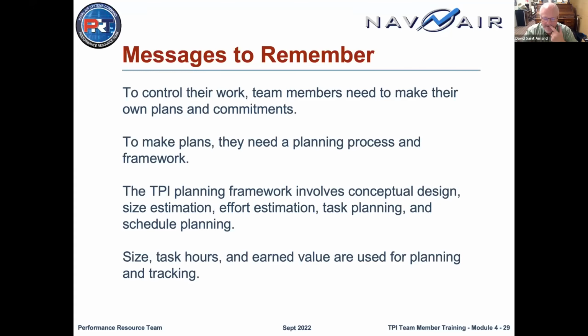I have a quick caveat to all of this, and that is that you can handle vacations and sick leave by figuring out how much time you've got and then knocking 10% of that off, or by going in and actually establishing in your schedule when people are going to be on vacation. And if you're working at the Naval Air Systems Command, do not assume that people are going to be fully engaged in their work from Thanksgiving through New Year's. That's a terrible idea because the place is practically a ghost town. All the civil servants are off enjoying vacation, and the contractors like Brad are busy in the empty hallways looking for things to do. Okay.